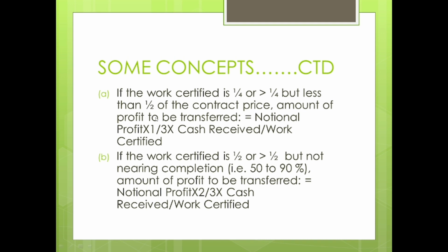As you do the practicals, you will understand this part: when I get notional profit, the entire notional profit is not transferred to the profit and loss account. I transfer a part of it. So how much should I transfer? The first thing that I have to see is how much is the work certified. As I already discussed, work certified is the amount that the contractor is eligible for receiving as payment from the contractee as certified by the engineer. Now you will see how much is the work certified.